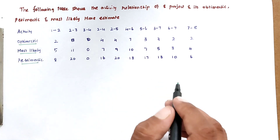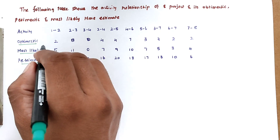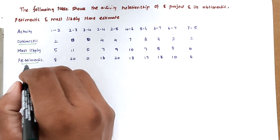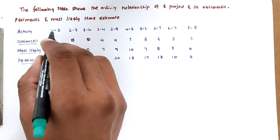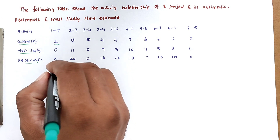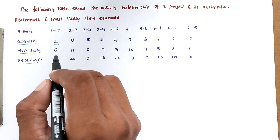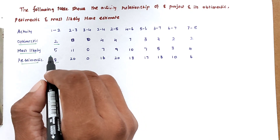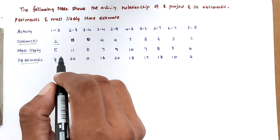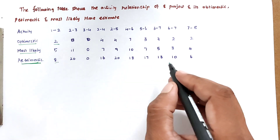The optimistic time means every activity is going very well as per plan. The most likely time is the average time. The pessimistic time accounts for unavoidable situations — for example, if we plan an activity for two days but some unforeseen circumstances cause it to take eight days. When plans collapse, the activity takes a larger time to complete — that is the pessimistic time.